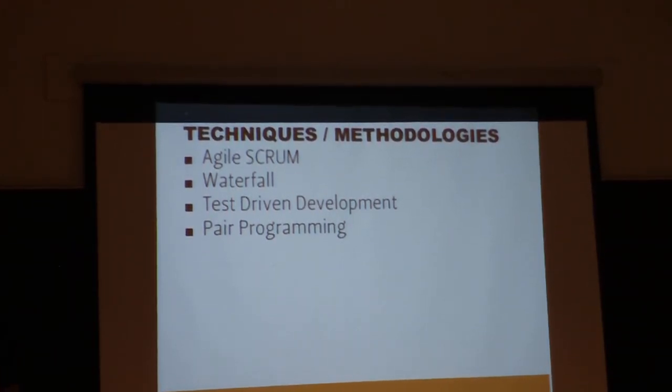It's an iterative process. You're doing what's called a sprint. So a cycle could be 2 or 3 weeks to 4 weeks long, building out a fully finished product, ready to go live. Now it doesn't necessarily need to be something that's ready to go to market, but the idea is that what we do in 4 weeks or 3 weeks is actually a full product, fully tested and ready to go.